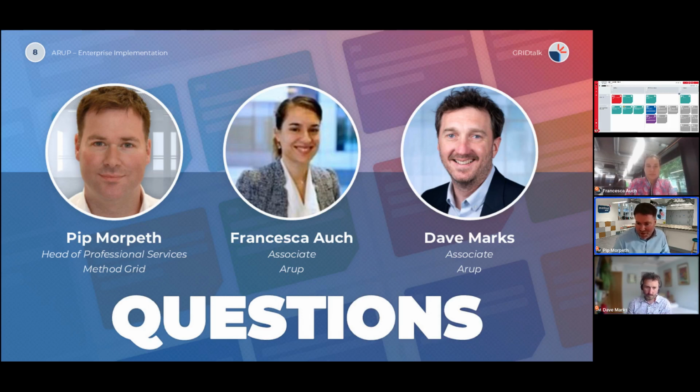Yeah, we've got similar clients that use Reba, and sometimes they're engaged only for stages 2, 3, or 4 and 5. You need that ability to work out which elements or which stages are actually relevant for your specific project, and then be able to adapt the grid relevant for that client or for that particular sort of appointment that you might be working with.